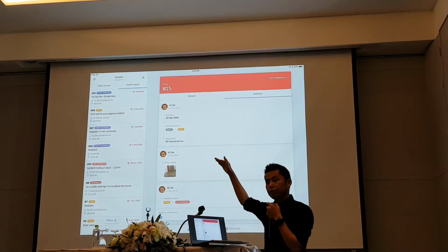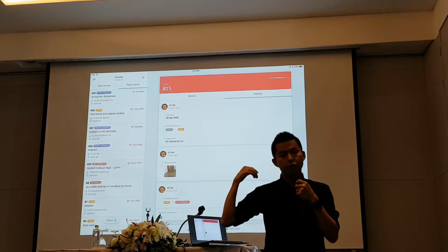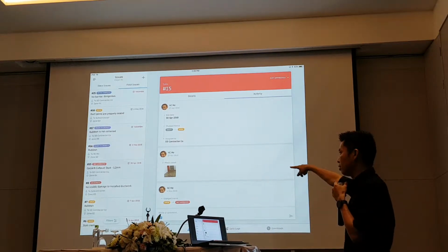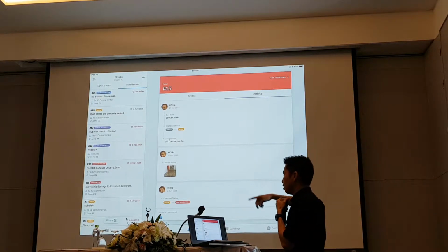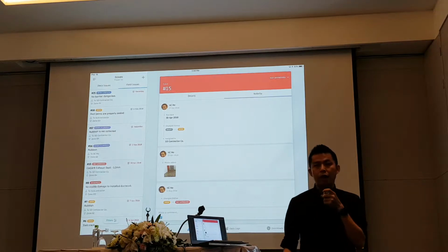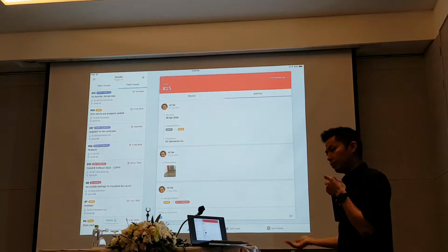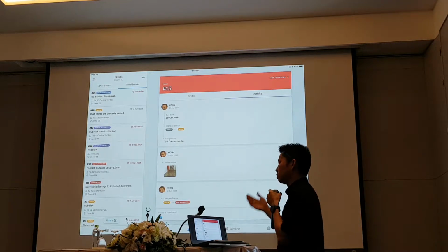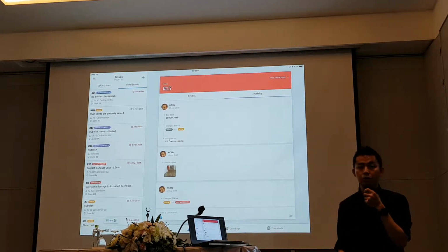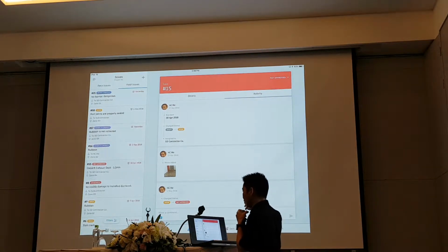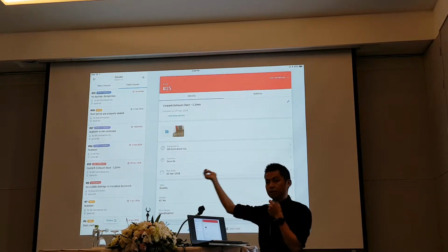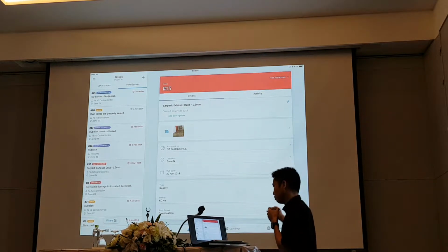So this is the workflow that is being done, and normally the question from your customer is, hey, can anyone change the status from one to another? Can anyone go in and change it from ready to inspect to in dispute, and so on? The answer is no. Only the creator and the one that you assign to can change the status. Only these two persons. Alright? I can change it now because I'm the creator. If I'm not doing it, then only someone attached to the SD contractor can change the status. Alright? This is the workflow that is being done.